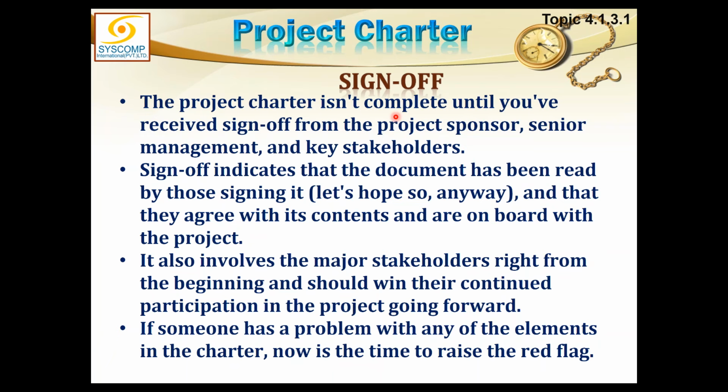Sign-off indicates the document has been read by those signing it and that they agree with its content and are on board with the project. It also involves the major stakeholders right from the beginning. So what I have done is the stakeholder needs and expectations. The most important stakeholders I have taken on board in the beginning, and they are the signatories of the charter, and therefore they own the project and should win their continued participation in the project going forward.